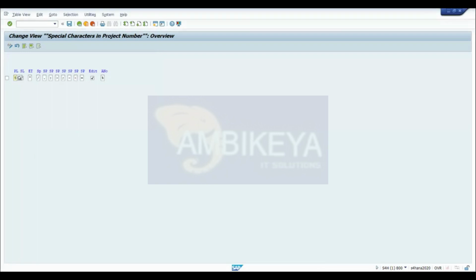Okay. So here note down a few points related to the special character. What is the use of this special character, and what is the drawback or limitation of this special character? So for the first limitation, or you can say the first prerequisite of the special character, we have to define only 24 characters, including all the symbols like special symbols, alphabetical and numerical values. Everything including, not more than 24. Basically, the project special character is used for the editing of the project.